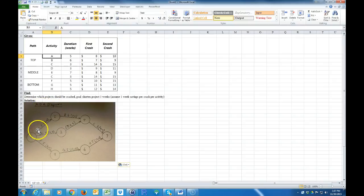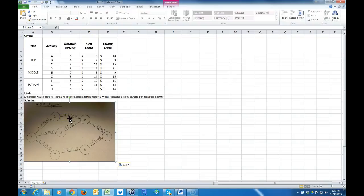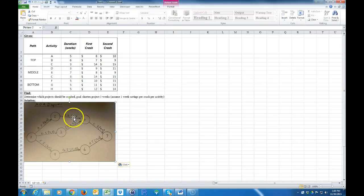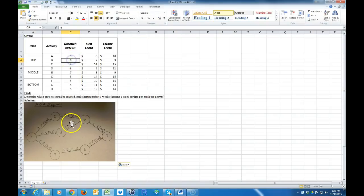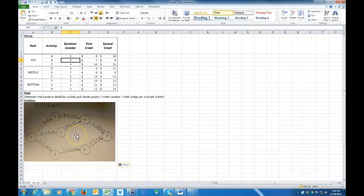Activity A takes five weeks, and then I have the cost of the first and second crashes. Activity B is six weeks, and then the cost of the first and second crashes. If I went ahead with the first and second crashes, it costs $7 and $9 for a total of $16 — I could crash this down to four weeks, reducing that activity by two.